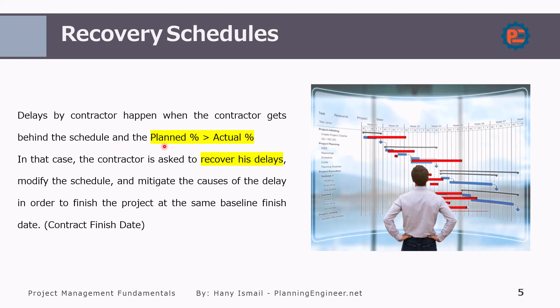We will find planned percentage is more than actual percentage, usually but not necessarily, because you might have the actual percentage more than the planned. However, the most important thing is the forecast completion date. If your forecast completion date is beyond the planned finish date, then you need to do a recovery schedule.